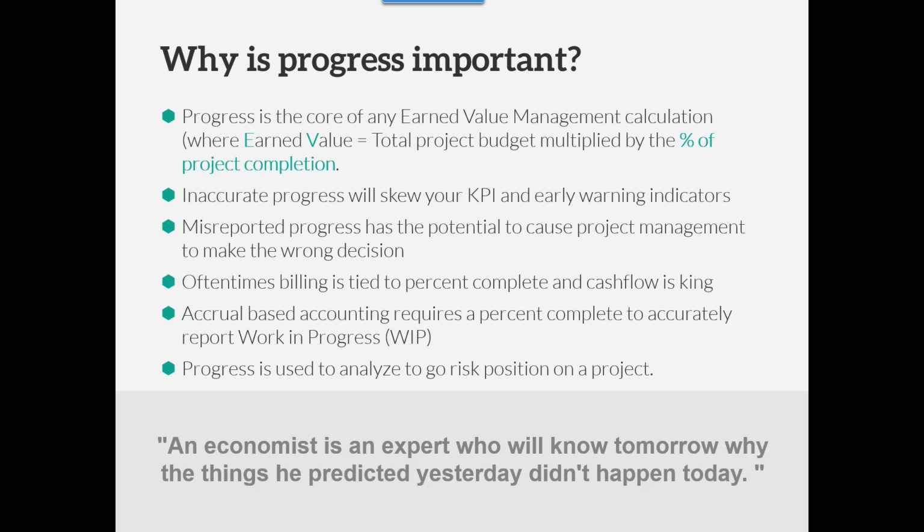So that's number one. Number two is cash is king on any project. On a lot of the projects we're looking at, while some are milestone based, we're seeing more and more projects tied to a percent complete. Whether you're sitting on the EPC side or the owner side, being able to agree and validate what that percent complete is matters, so as not to choke an EPC contractor on billing, and also, from the owner's risk profile, not to overpay your EPC for work that's not complete. It all comes back to that percent complete calculation and validating where you are.